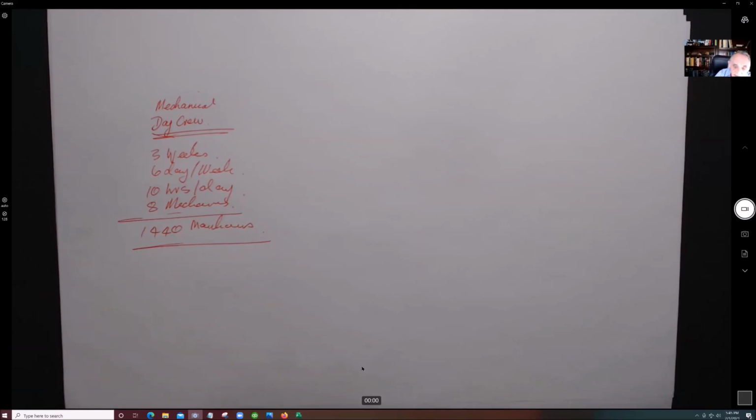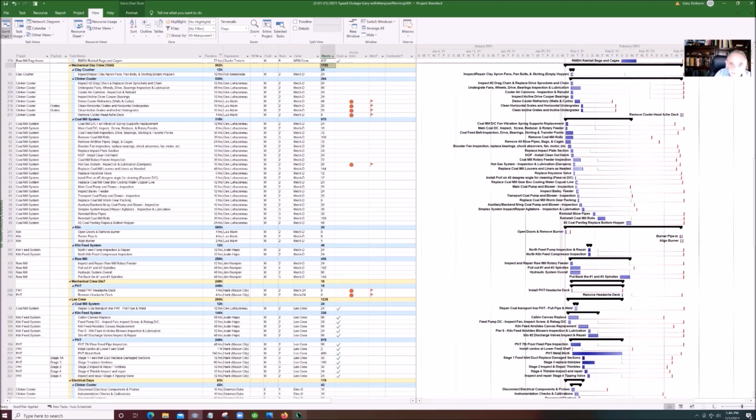So what do we have to do in this situation? Well, there are several possibilities. Number one, we can have a look at the work that's available here, and we can decide not to do some of it. That's one option, but not a very common solution. The next option we have is we can contract something out.